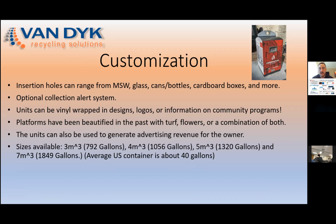However, these units are all customized for your specific needs. So lead times getting them to the United States and shipping from the Netherlands can take a couple months. Shipping is crazy right now, so I don't feel comfortable giving an exact timeline, but it'd be safe to say probably a couple months from start to finish to get them here. But once they're here, it's a very, very quick and easy process.